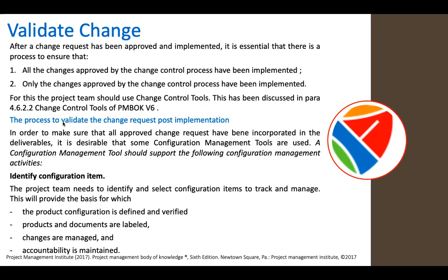Okay, the project team needs to identify and select configuration items to track and manage. This will provide the basis on which the product configuration is defined and verified. Products and documents are labeled, changes are managed, and accountability is maintained.